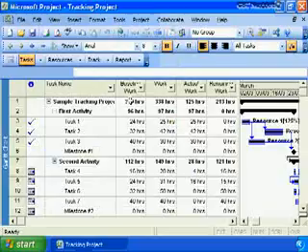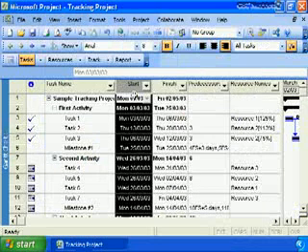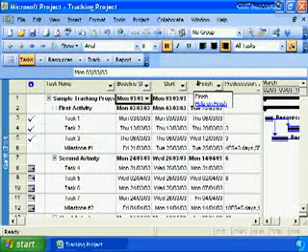In order to do that, we need to change the information we're showing in our Gantt view. So let's remove these columns. We'll hide the baseline work, the work, the actual work, and the remaining work. That kind of detailed information we're now tracking and managing in the task usage and the resource usage fields. So we're going to add different information to this view to allow us to better understand how well the project is delivering. Let's add in some more baseline information. Let's add baseline start, and adjust the size of that a little bit. Let's add baseline finish.